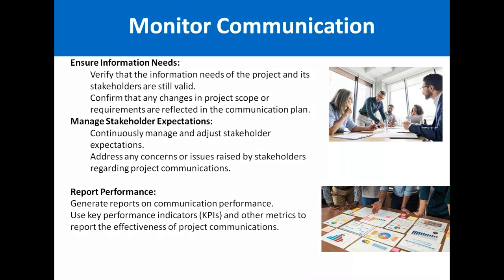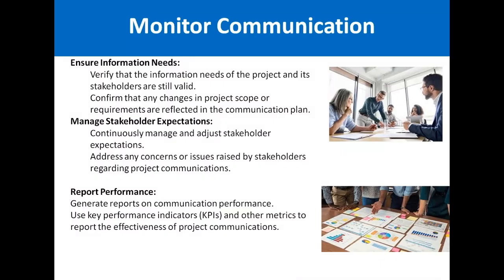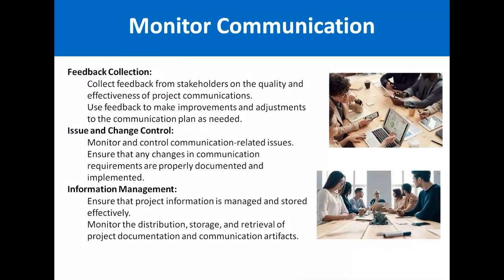Then report the performance. Report performance means, friend, that we have a planned work and we have an actual work. Planned work means, for example, we have to deliver 5 modules to the customer, and the actual work is that we have only completed 4 modules. So you have to communicate the performance indicators. You have to provide transparent and actual reports to the customer, so that they have the actual performance and the actual status of the project.